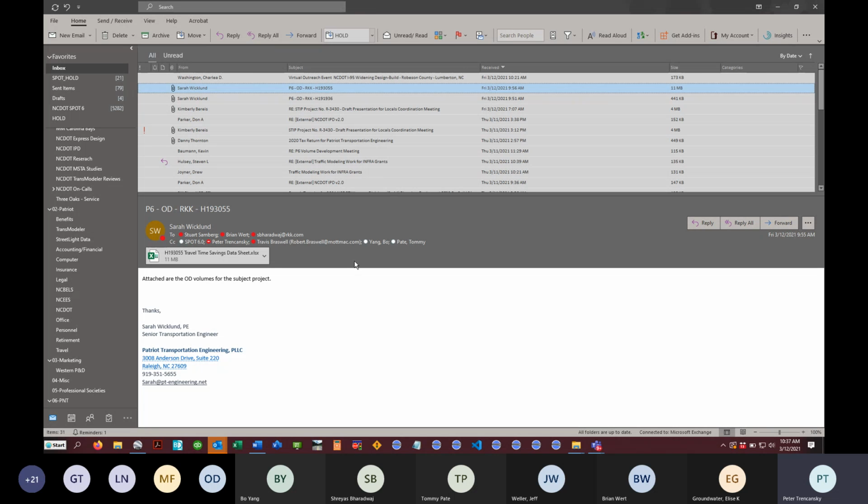I guess they are still contemplating doing a 3-year STIP cycle for this as opposed to the 4-year. So there's still the possibility that they will be moving ahead with the draft TIP this fall, which means they need everything from us by the end of June. So we're losing 6 weeks on the back end and a week on the front end. So it's going to be a more aggressive schedule, I think, based on the number of projects and the man days. It should still be viable.